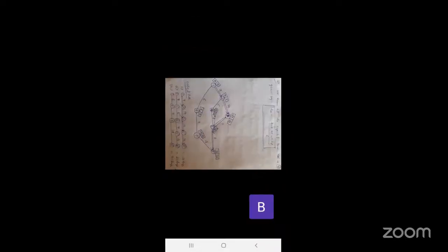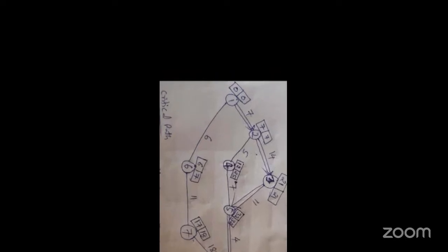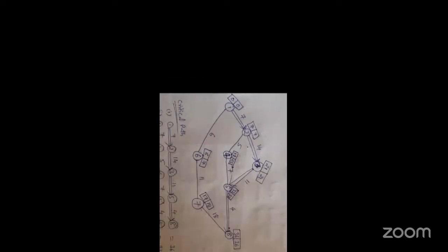And this is the network diagram. Once the network diagram is obtained, indicate all critical paths with a double arrow mark, and fill in the earliest starting times and earliest finishing times in the forward process and backward process. First, we have to fill all these values on the critical path, then come to the remaining events. So I got the values like this: 0, 0, 1, 2. The remaining part is similar to the previous example.